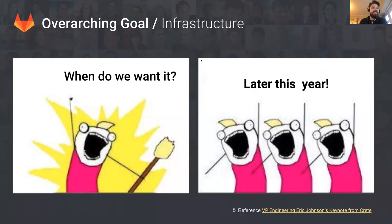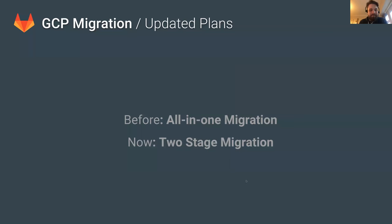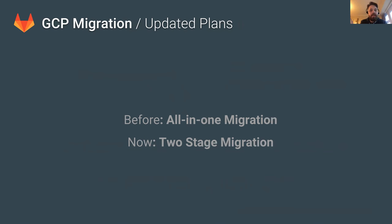Let's discuss the GCP migration in a little bit more detail. The plan had previously been to migrate directly from Omnibus running in Azure to Kubernetes in the Google Cloud Platform. However, due to some factors external to the project, we found that we needed to complete the GCP into cloud migration earlier than we'd planned. This meant there were changes needed to make GitLab run in Kubernetes that could not be done within this timeframe.